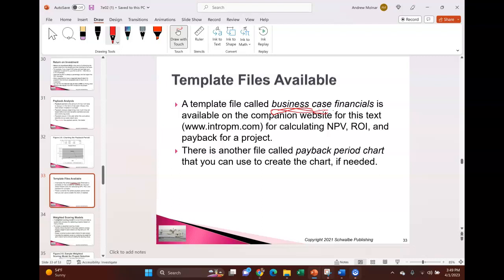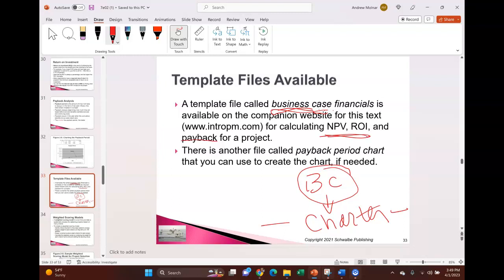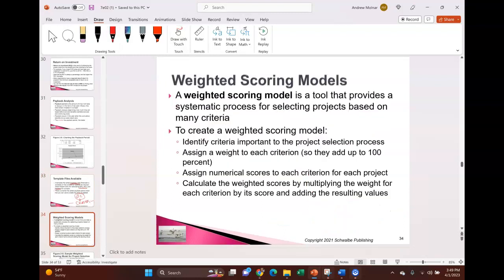The C-suite is going to produce a business case for you. From the business case, you're going to develop your project charter, right? This is what you do at the start of a project. If I'm a project manager and I'm told to start a project and develop the charter, the first thing I'm going to ask for is the business case, because it's going to have all of these things already worked out in it, including the corporate strategy, what they're trying to achieve.